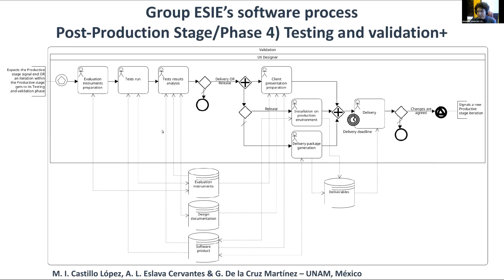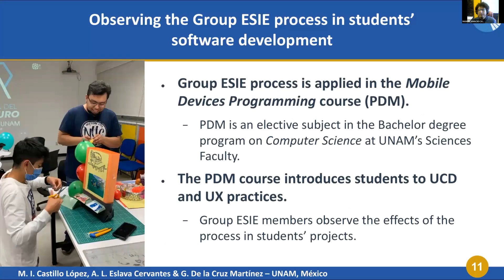When the iteration includes a portion of the final release, the closing phase begins and a presentation for the client is prepared. Depending on agreements, delivery can also happen or the product can be installed into its production environment. In the end, new agreements can be reached to start a new productive stage so we can produce a new version of the product.